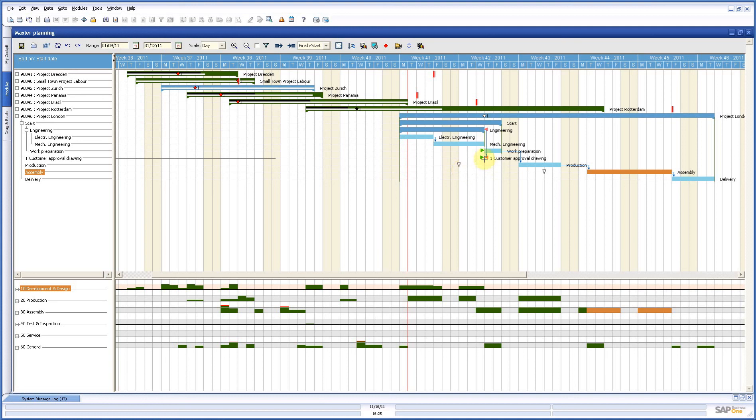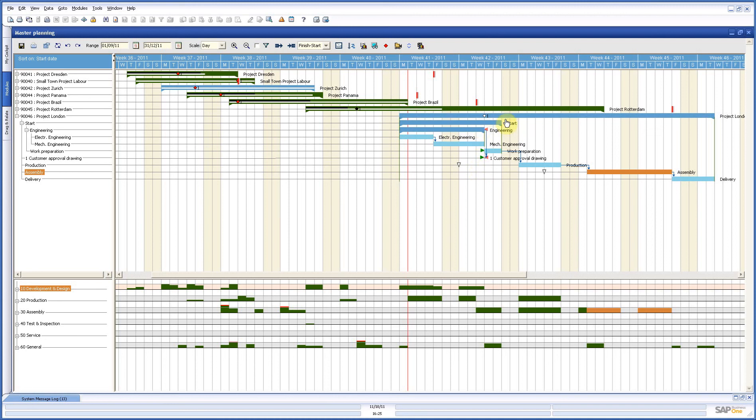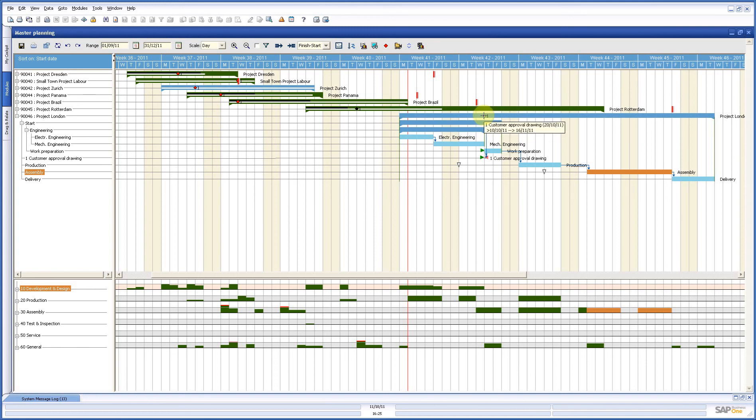And the last thing important for this planning project is this icon, the green and red symbol, which represents a milestone and you can also see that milestone on the project bar above. Milestones are very important, they can mean very important steps in your project and in this project bar you can have a couple of milestones. And one of the things you can do is link invoices to this milestone. So what could be here is that if this milestone is finished, you can send your first invoice for instance. So that is a very powerful tool as well.